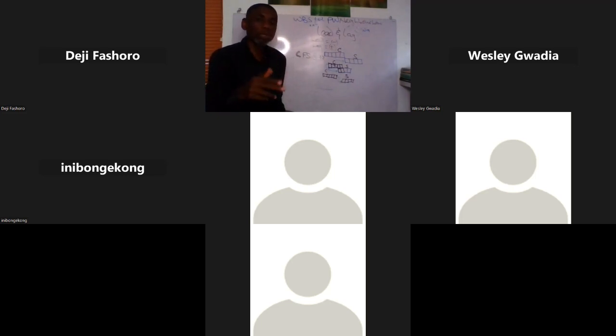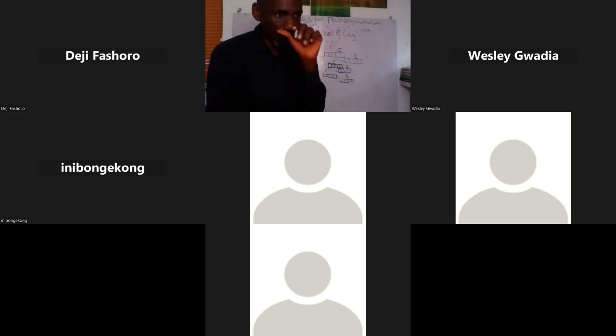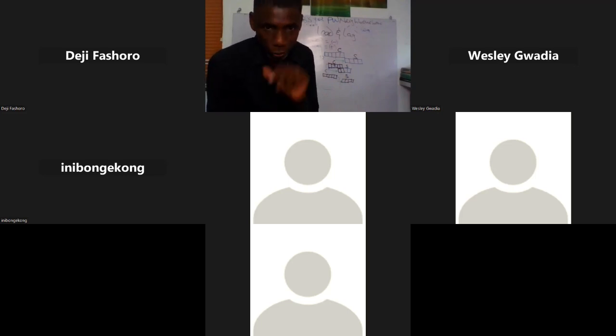Now, this happens with some task relationship, depending on what you and your team have seen the task to be. You use this basically if you have to maybe wait for a test result to come out. Maybe you know that after casting a column, you don't want to take the risk and start the substructure, and then the result of the test will come and it will fail, and you need to redo that concrete. If it does not reach a certain level of Newton per millimeter square,